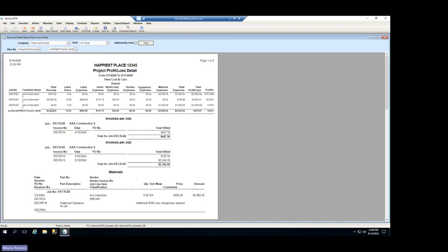Whatever burden code you have created in NextGen, whenever you have your labor entry processed and posted, whatever burden code you have tied to that labor entry will then calculate what burden expenses come in this column. Equipment expenses are when you have units tied to your entries for these particular jobs and what you have under the allocated and rental hourly cost field for that specific piece of equipment.